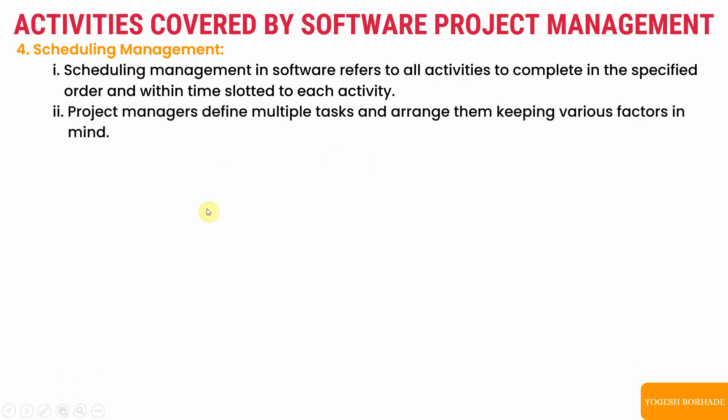Project managers define multiple tasks and arrange them keeping various factors in mind. They distribute tasks to different teams or groups. For example, if Team A is good at object-oriented programming (Java) and Team B is good at procedural languages (C), and the project requires an OOP component, the project manager will assign that component to Team A since they can complete it within the allotted time.